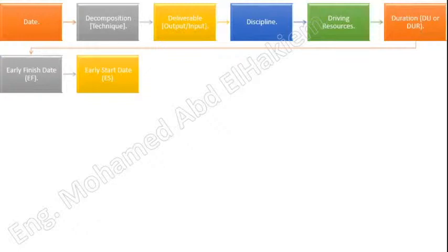Early start date, ES. In the critical path method, the earliest possible point in time on which the uncompleted portions of a schedule activity, or the project, can start, based on the schedule network logic, the data date, and any schedule constraints. Early start dates can change as the project progresses and as changes are made to the project management plan. See also activity early start date and project early start date.